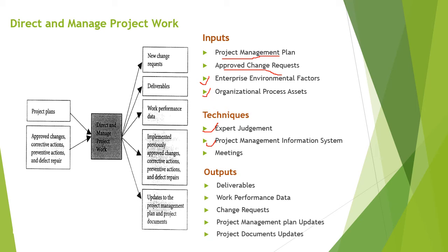Next is meetings. Obviously, the project manager needs to conduct a lot of meetings while executing the project with the team members and important stakeholders. The important point is that meetings should be prepared with a well-defined agenda, purpose and objective, and time frame, and should be appropriately documented with minutes and action items, right? And these minutes of meetings should be stored as defined in the project management plan, right?